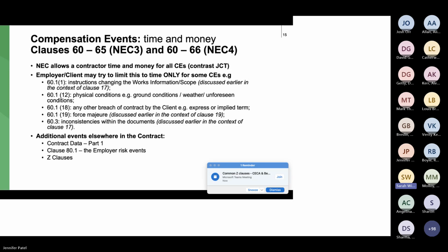Usually it's within the scope or the programme. So you've got to have that piece of paper in the contract that says, for example, the client needs access to the site on these days and they require them on different days. You've got to prove that, so it's more difficult to prove. Whereas JCT is wider and vaguer, so it tends to say things like, if the employer doesn't do something it could reasonably be expected to have done within a reasonable period.